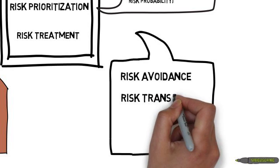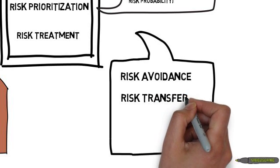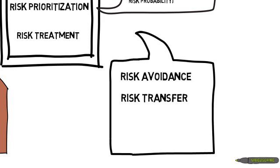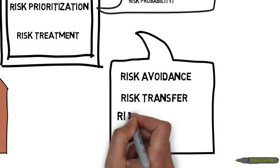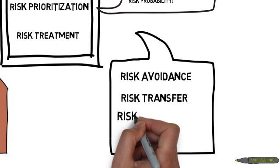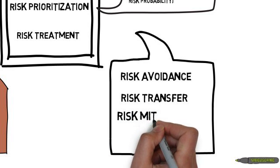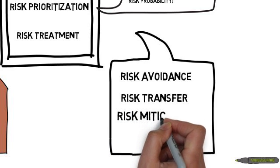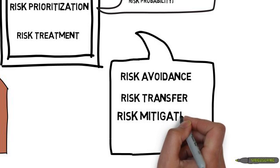Next is risk transfer. If the risk is, for example, the compromise of system security, it is possible to hire a specialized company to perform the security testing and system hardening. The risk is then transferred to the other company.